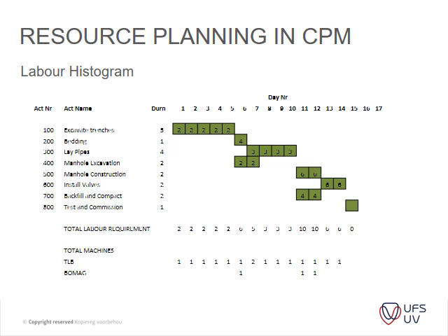You list the items and you draw your Gantt chart, and in Excel you can put in your labor requirements. Here they only put in the labor requirements, so the amount of plant is listed at the bottom. You can see how the labor is added up. It goes up to 6, 5, 3, and then you peak at 10.